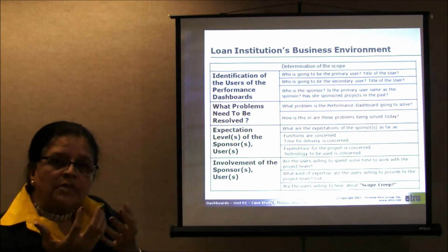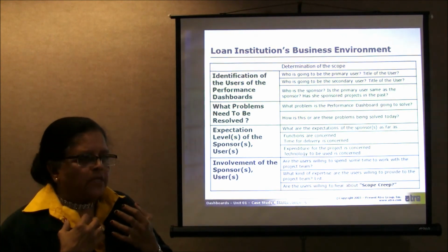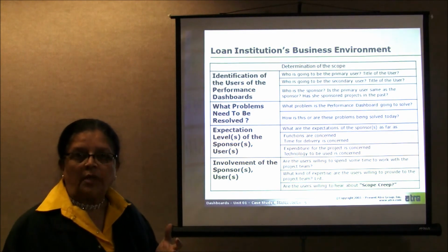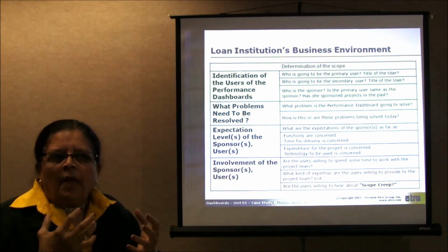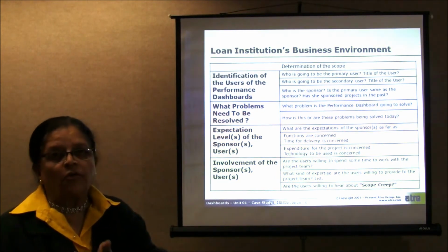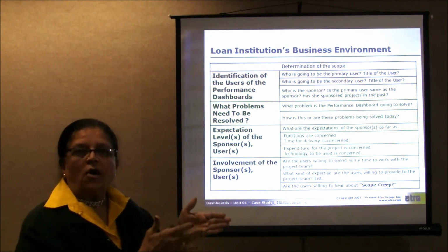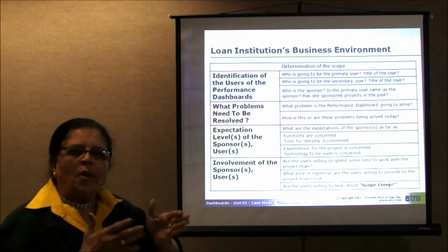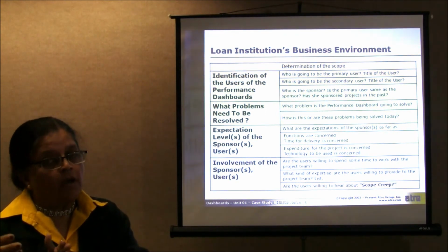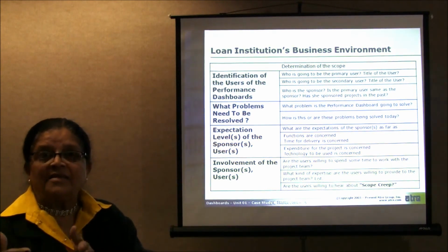So we have to have some better understanding, without insulting the users or the sponsors, about scope creep. There has to be an understanding between both parties that if the scope is going to be increased, then it's going to take longer and cost more. So how about adding whatever new things were not agreed to in the beginning in release number 2?